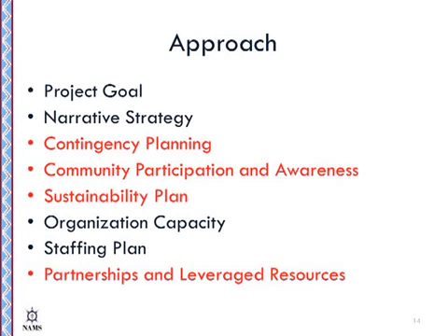The challenges you describe should directly relate to the assumptions you have made regarding the project's implementation. A good way to conceptualize assumptions is that they are nothing more than your activities as listed on the OWP. Which of the major activities listed have the potential to delay or possibly derail your project should they occur? Remember, not all of the activities have that potential. Only list those that could possibly impede progress should that challenge occur.